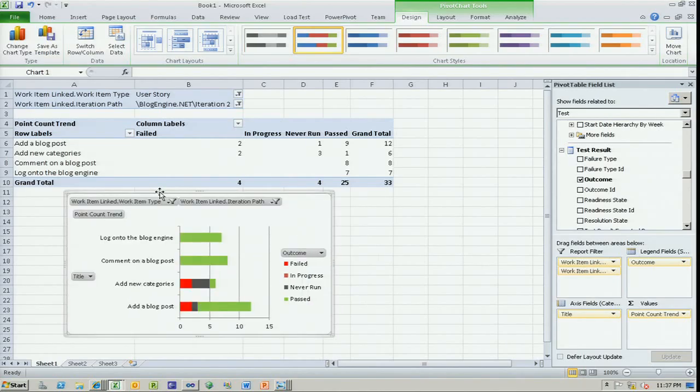Now, what can you get out of the cube? You can get a massive amount of data out of there. And the data can be used in positive ways or negative ways. And I want to have just a moment to talk about how not to use the data. Don't use it to evaluate individuals. Well, so-and-so checked in 20 times as much code as you did. Therefore, you're fired. Or you get a bonus because you fixed more bugs. Why don't you do that? It destroys your teamwork. It stops people from collaborating with one another, from working with one another. It's a dangerous way to use metrics.